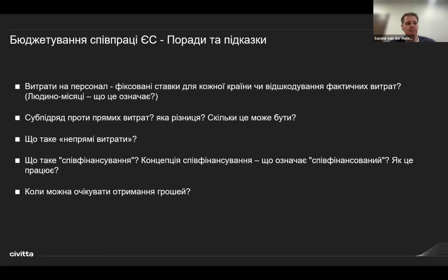That means the salary costs, the taxes, social insurances, etc. All costs that the employer has. And in some cases, some schemes have actually identified the fixed personnel cost for one full-time equivalent person per geography. This is in a minority of cases, but it's important for you to identify this if this is the case, because it will affect how you calculate budgets.